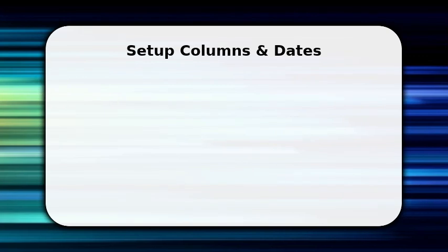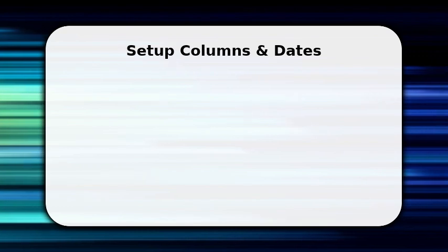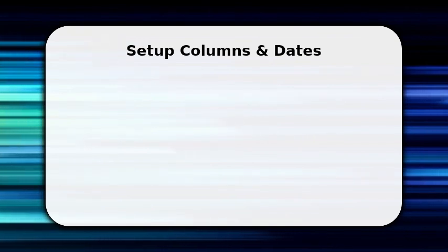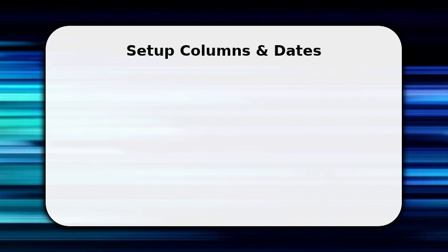Enjoy the video. You begin by building the spreadsheet framework: task, start, duration, end, percent complete, and predecessors. Enter real start dates and use duration in days so formulas behave predictably. Once the table is created, convert it to an Excel table for autofill and consistent formatting. This makes formulas copy down automatically.